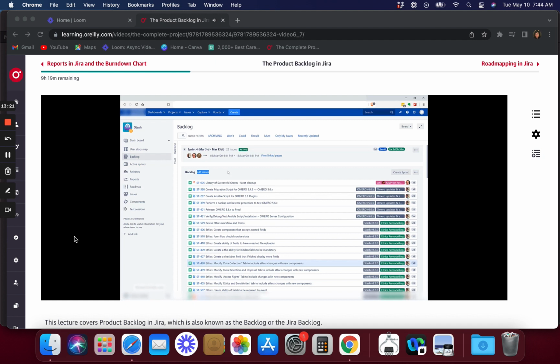in our backlog. And this is basically what we use when we're doing our sprint planning and planning what we're gonna be working on next, right? Our next sprint. We look at our backlog and then we take a subset of the user stories or tasks or epics that we have there, and we add them into our sprint backlog or the next sprint that we're going to be working on, right?